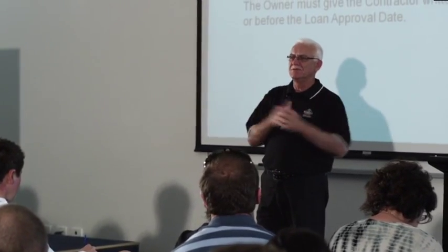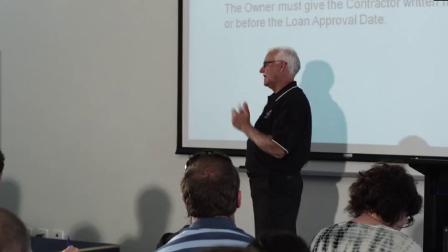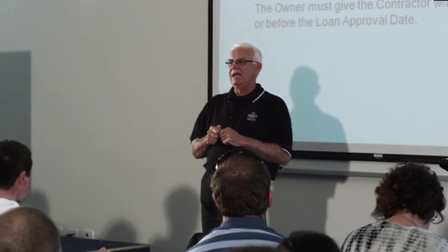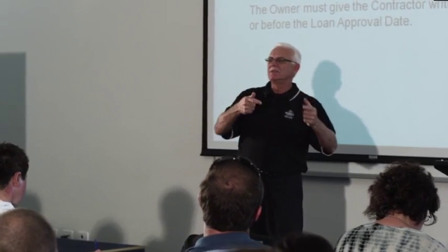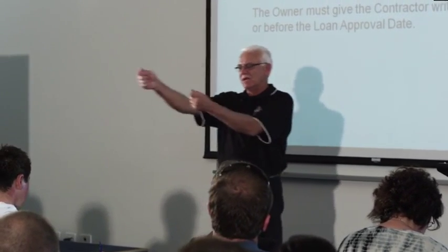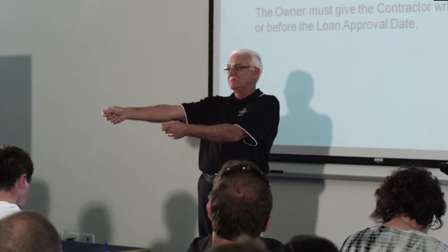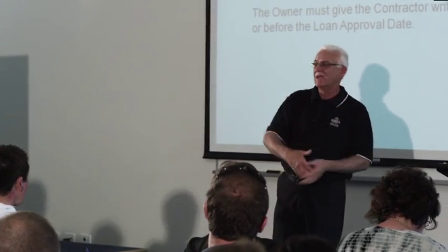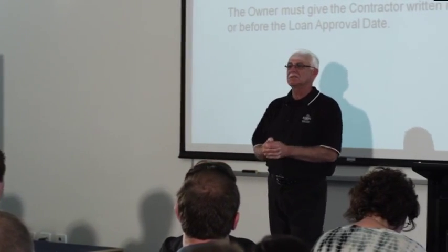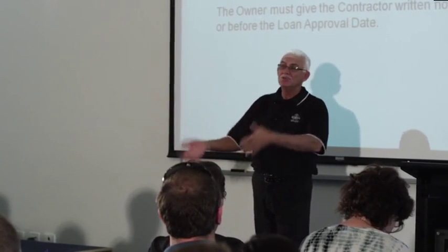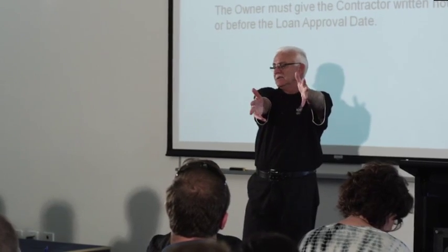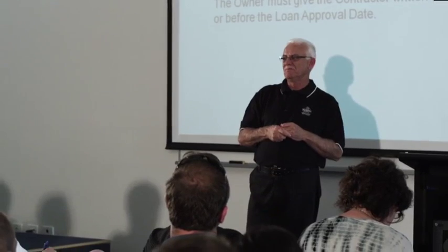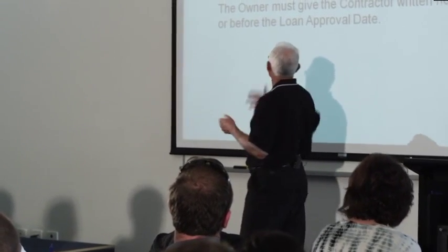The process is fairly simple. They've got a certain period of time. They go to their bank or lending authority, they get approval, and usually the lending approval will come direct, a copy will come to you, so you know that they've got their finance approval. The contract says that when they do that, you can start, if you've got everything else, and you will get paid your progress payments, usually by the financier. So finance approval is fairly simple.